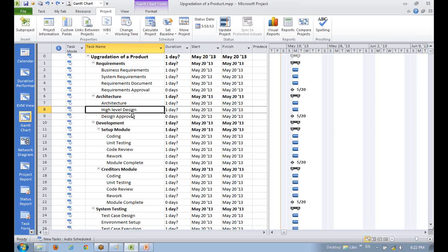But if it is your team, you are part of the vendor organization. Correct. I think you also bother about efforts because you are the bridge between the client and the offshore team. So I have to keep track of both things, effort as well as duration. Right, because if efforts are not right, your duration will not be right.